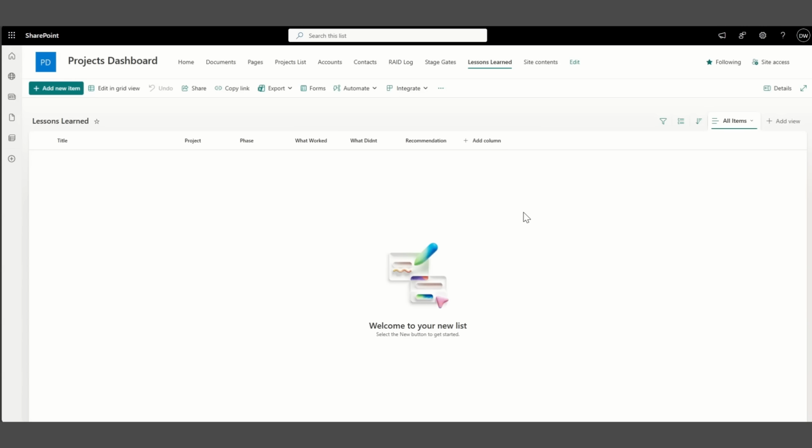You could do more damage just straight away updating your SOPs, your procedures, based on every single recommendation which is ever entered by anyone. It could do more damage actually than not. So having some form of approval process to make sure that every recommendation is going to be of a benefit and that somebody else agrees with that can often also be useful as part of the system. But I'm just showing you a very basic, simple lessons learned log at this point.